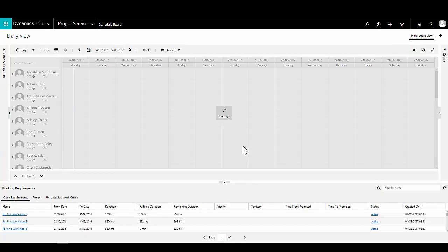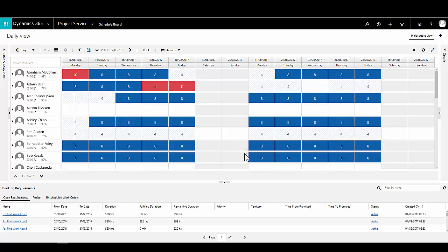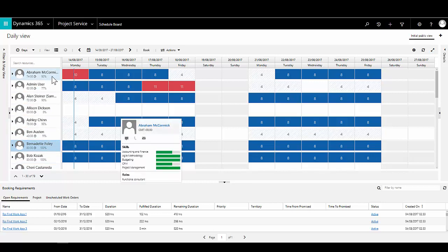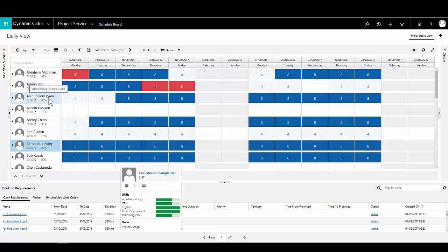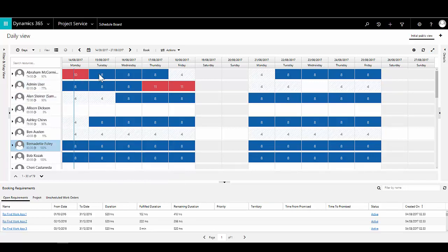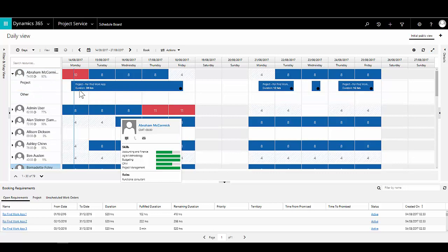To see bookings made across all projects, we have the schedule board in Dynamics PSA. Here we can see, across all resources within the organisation, what bookings have been made on a day-by-day basis. We can see white space across the team, who is overutilised, who is underutilised, and what we need to do to make best use of our resources. Expanding a resource's row shows the specific projects and the duration for which that person is booked.